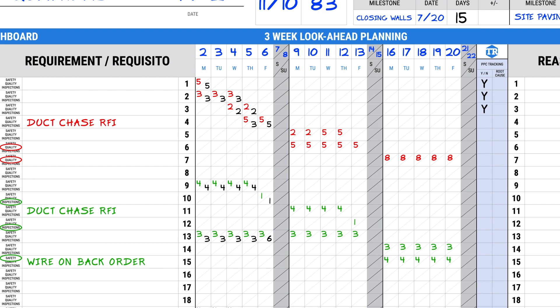The electrician also completed the tasks he committed to, which will be scored yes as well.